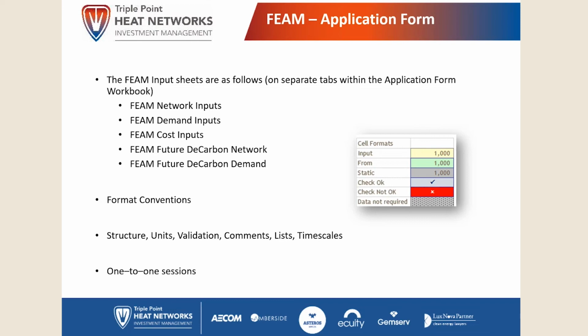So at the top of this sheet are the different generation technologies and the technical information we're asking for. At the bottom of this sheet is a quite important block of data. This is where at a summary level the revenues are shown profiled, and then the costs are shown in cash terms: capex, repex, operating cost, fuel costs, etc. And down here in this cell, which is I642, it calculates the internal rate of return. This will be the internal rate of return that our FEAM generates.